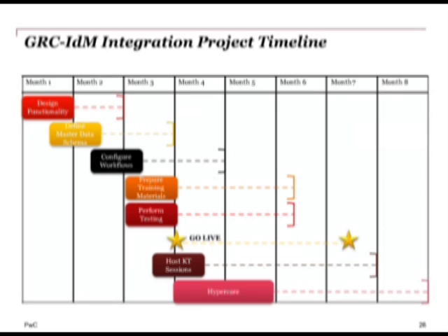You can configure your workflows. Then you have a pretty extensive training and testing phase, followed by KT, and finally hypercare. So the big success factors here, if we're looking through the different phases: from a design, it's all about the simplicity of the design, right? You're coming up with the right features to meet your requirements, but that are also hitting key compliance checkpoints and also being able to be sustained over the long term. After you get this live, you want to make sure that it remains a viable and relevant solution.